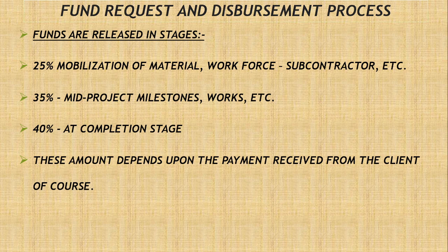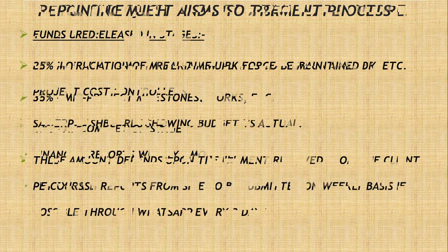25% of funds are released upon mobilization of material, workforce, subcontractors, etc. 35% with project milestones, works, etc. and 40% at completion stage. These amounts depend upon the payment received from the client, of course.